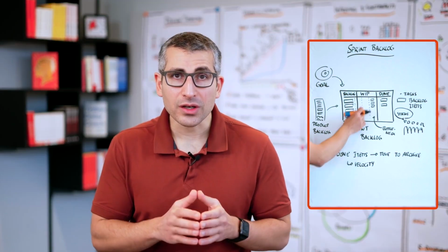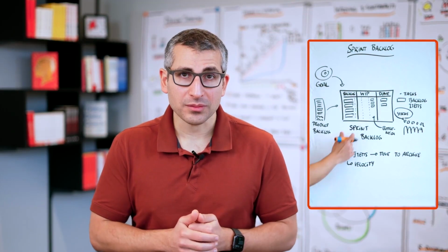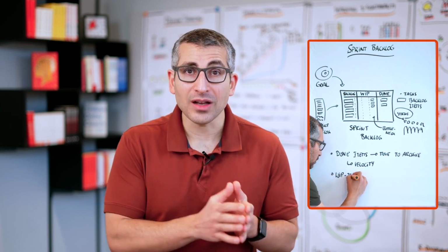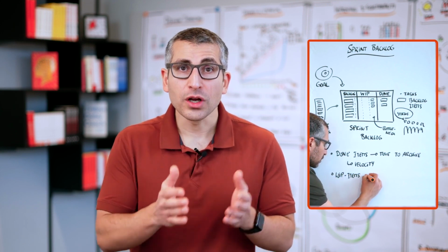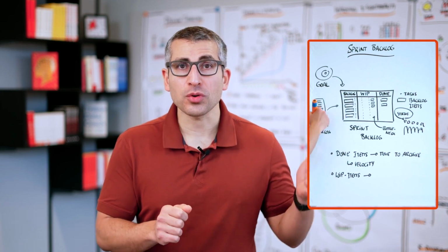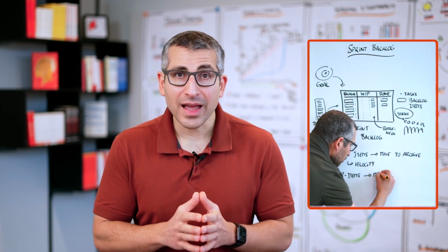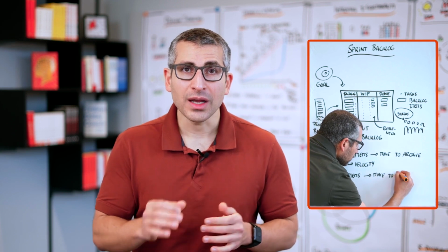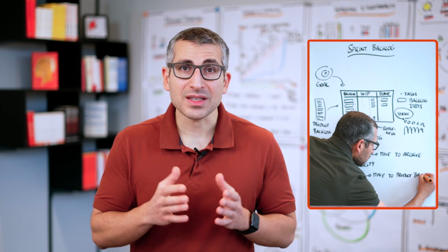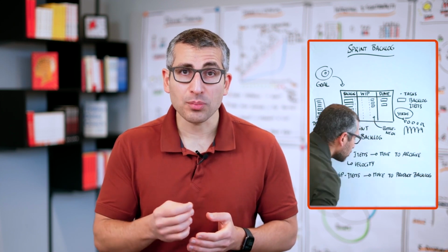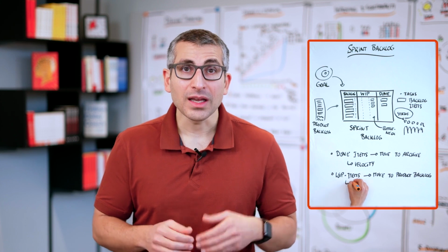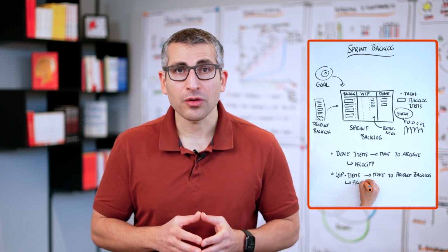Next, we take a look at the column work in progress. If you have started working on something, but it's not been done or finished within your current or past sprint, you still move it back into your product backlog. It is then at the discretion of the product owner at which position they want to keep it. Do they still believe it's the highest value and the most important item? Then it ends up at the top of our product backlog. If not, it might end up further below.